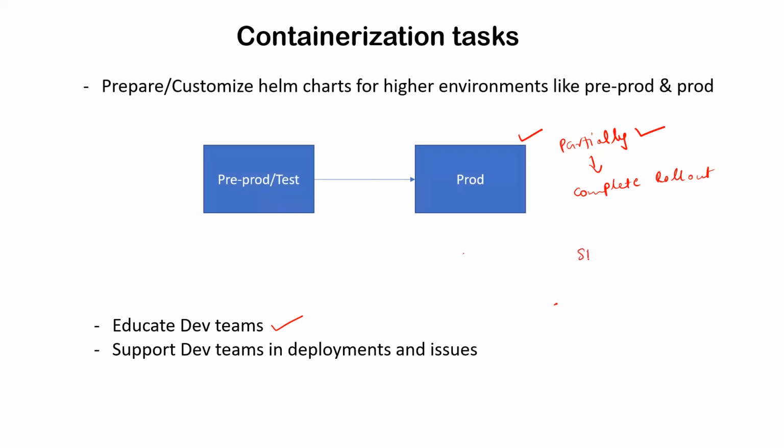For now, to keep it simple, a sprint in agile mode means a short period wherein the team works to complete specific tasks or a specific milestone, or the team can work on some deliverables to deliver to the client. So in our case, a sprint used to be 2 weeks. Within these 2 weeks, in the beginning of the project, we used to take one application per sprint. But later, when we got adjusted with the team, we used to take two applications and migrate the applications from VM to the Kubernetes cluster.